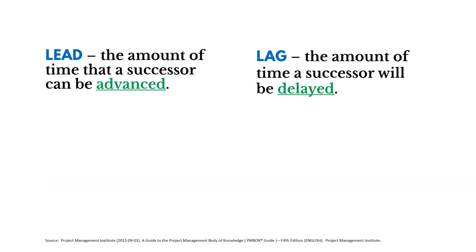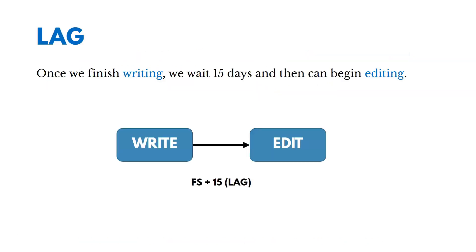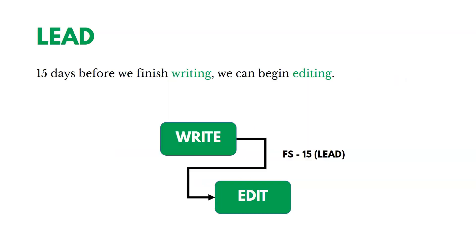A lead is the amount of time a successor activity can be advanced — started early. A lag is the amount of time a successor will be delayed. For example, a lag: once we finish writing, we wait 15 days, then begin editing — that's a finish-to-start with a lag. A lead example: if we have a finish-to-start between write and edit, we might start editing 15 days before we finish writing — starting earlier than normal.